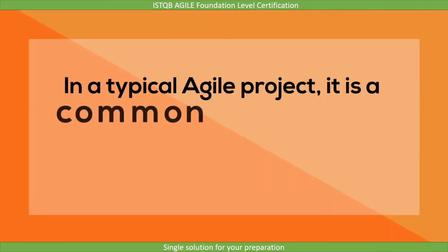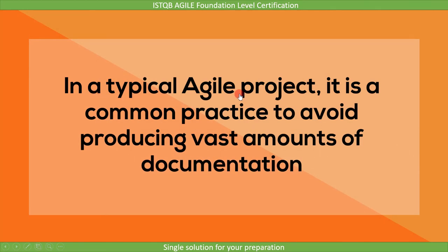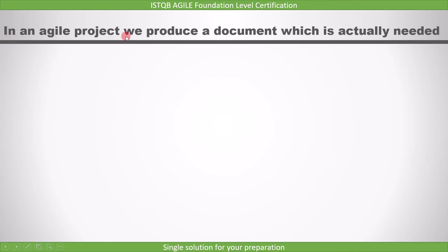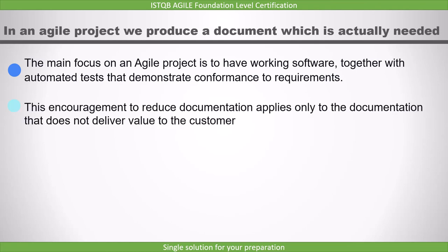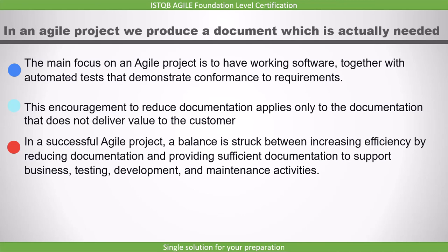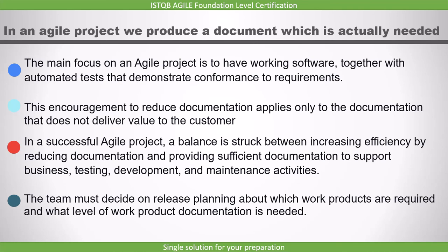Regarding documentation, the most important point is that in a typical agile project, it is common practice to avoid producing vast amounts of documentation. In an agile project, we produce only the documentation that is actually needed. The main focus is to have working software, together with automated tests that demonstrate conformance to requirements. This encouragement to reduce documentation applies only to documentation that does not deliver value to the customer. In a successful agile project, a balance is struck between increasing efficiency by reducing documentation and providing sufficient documentation to support business, testing, development, and maintenance activities. The team must decide during release planning which work products are required and what level of documentation is needed.